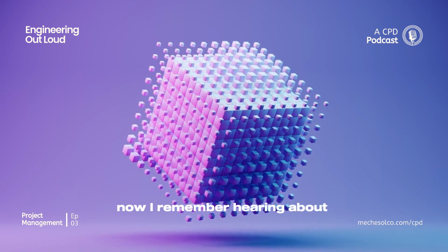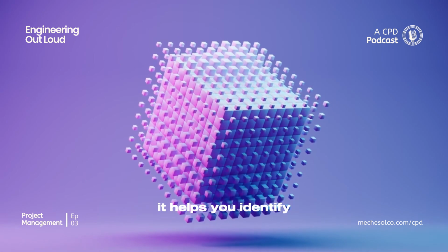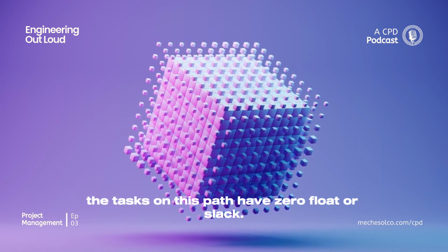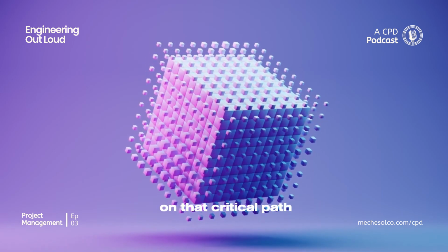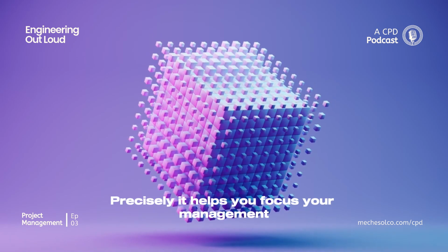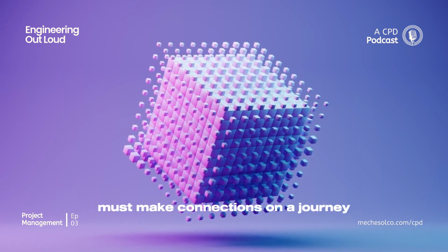Keeping it dynamic. Now, I remember hearing about the critical path method. What's the key thing to understand about that? The critical path method, or CPM. It's a really powerful analysis technique. It helps you identify the longest sequence of dependent tasks through the project. The longest path determines the total time. Exactly. That longest path is the critical path. The tasks on this path have zero float or slack. Zero float, meaning? Meaning any delay in any task on that critical path will directly delay the entire project's finish date. There's no wiggle room. Ah, okay. So those are the tasks you really need to watch closely. Precisely. It helps you focus your management attention on the most time-sensitive activities. You calculate earliest start-finish times, latest start-finish times to figure this out. Like knowing the absolute must-make connections on a journey?